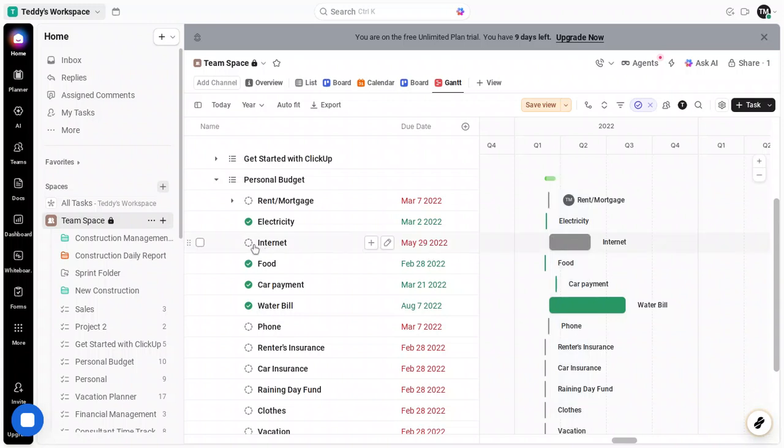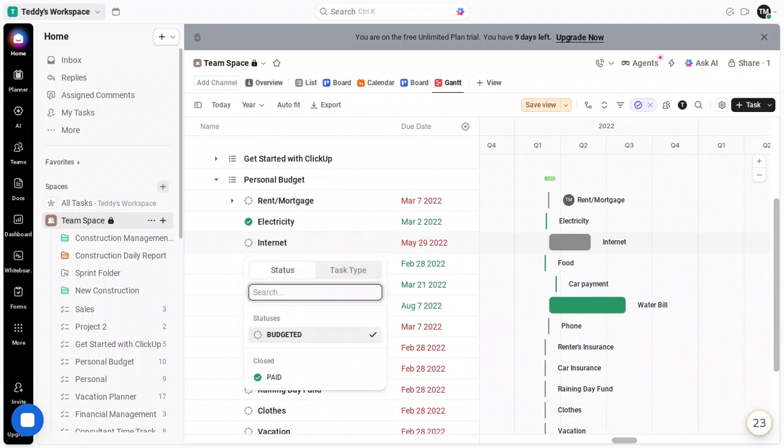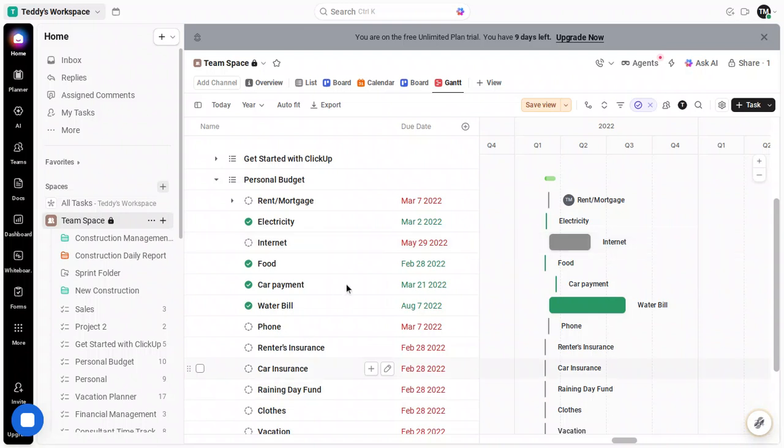With that highlight in place, let's take one more turn through the coloring logic so you can see another way to organize the chart. Go back to the Settings button at the top of the Gantt view, open More Options, and select Color Tasks by again. This time, choose List. Coloring by list makes the chart use the color assigned to each list in your space, rather than the status or priority color.